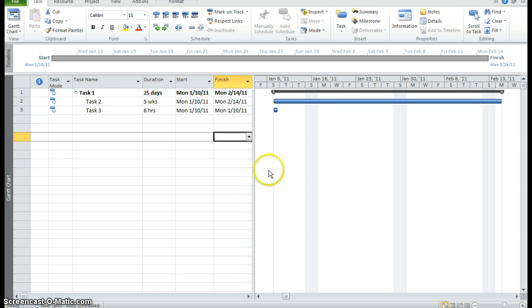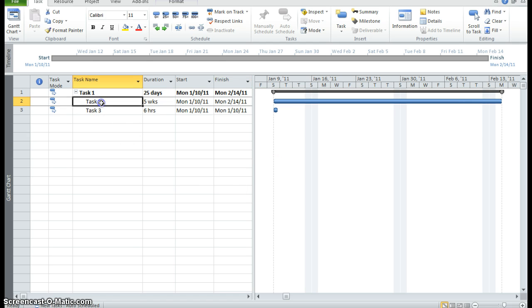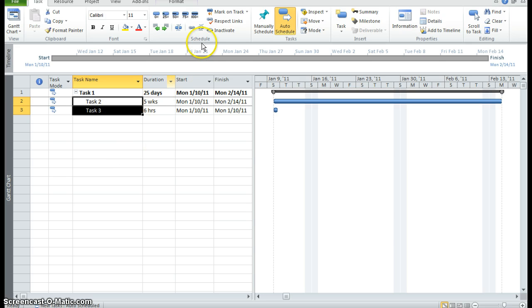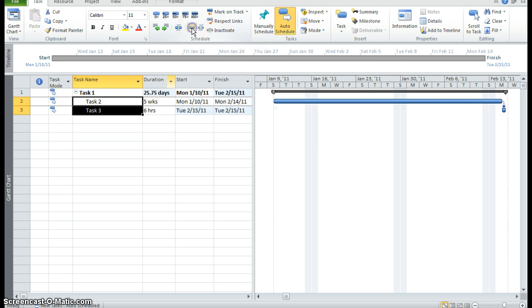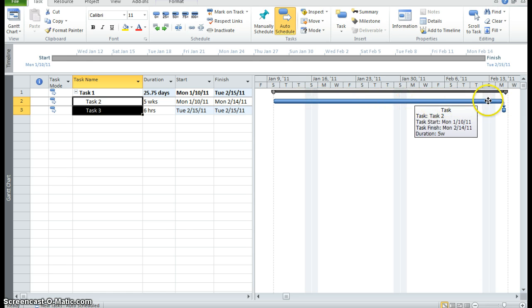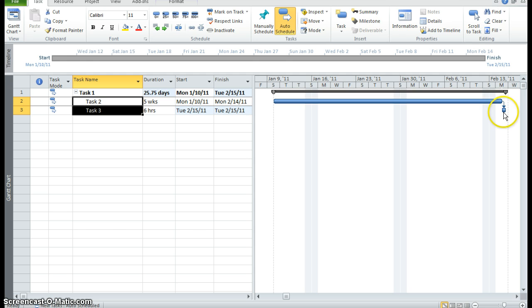Now what I want to do is I want to link task 2 and 3 together. So I'm highlighting task 2 and 3. I'm going to the schedule group and I'm clicking on link. This shows a relationship between the two tasks. When task 2 is complete, task 3 will begin.